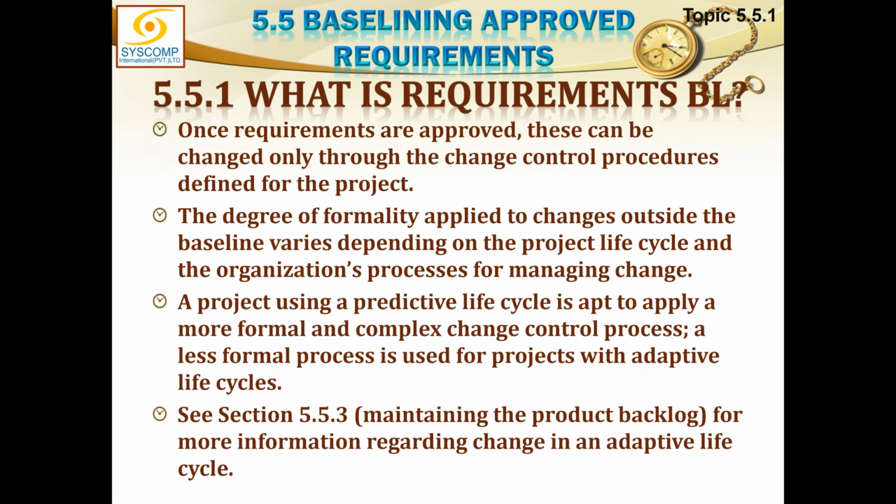A less formal process is used for projects with an adaptive lifecycle, because adaptive revolves around change itself; you are releasing the product in iterations, and iterations have a tendency to change. Maintaining the product backlog is how change is handled in an adaptive lifecycle.